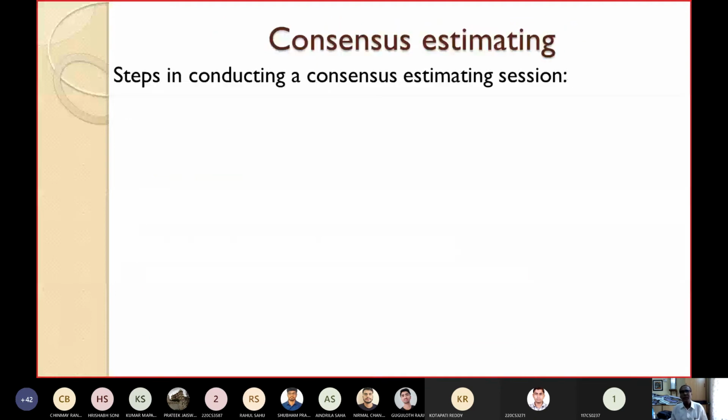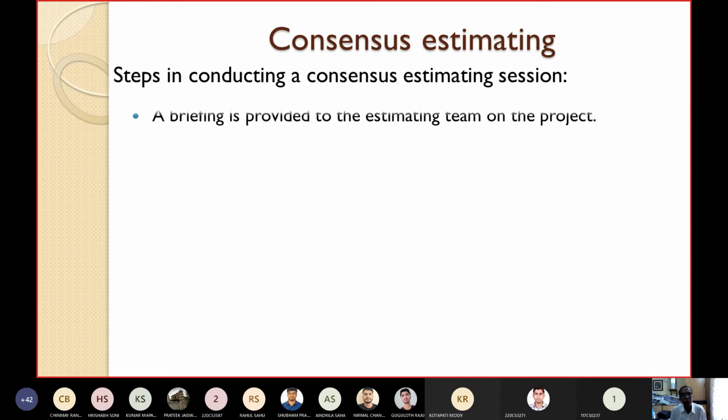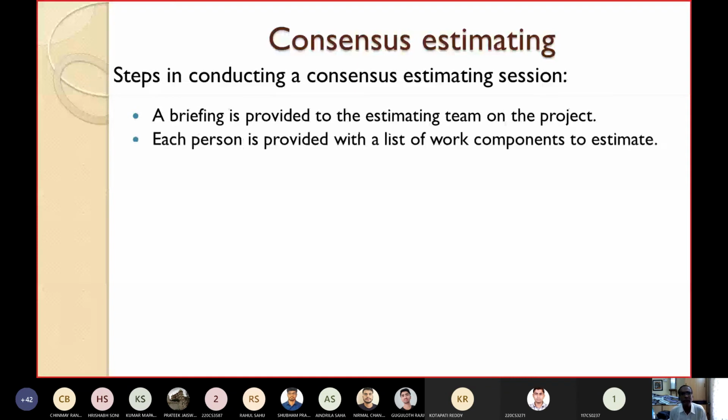Then we will discuss consensus estimating. Let's see how we can get the consensus value in estimation. The steps in conducting a consensus estimating session are like this. First, a briefing is provided to the estimating team on the current project.